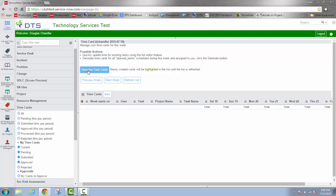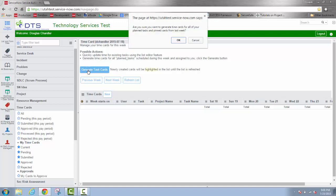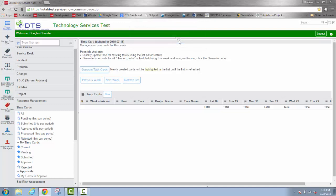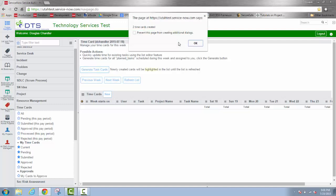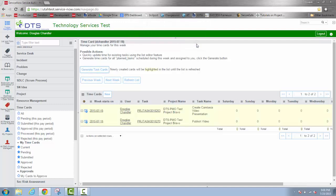This generate task cards button. This will automatically create rows for all of the project tasks that are directly assigned to me. It will not generate the ones that I have access to through a work group affiliation, but only those tasks that are directly assigned to me. It's asking me if I'm sure I want to do that. Yes. Now it's informing me that it's going to generate two time cards because those are the only ones directly assigned to me. Remember we also had some that were indirectly assigned to me or assigned to the work group that I'm a member of. I would have to bring those other ones in individually by clicking on new.